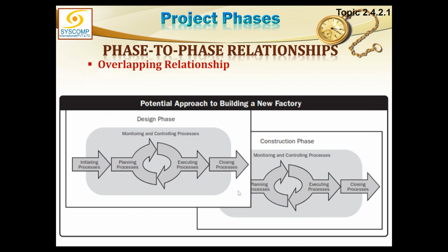This is how it looks when you are working with overlapping phases. You see the design phase is still going on. It is still not closed, but much before it's closed, you have already started the construction work, right? So I don't say this is not possible. I am saying yes, of course, people do it like that, and that is very much applicable also. But this increases the risk. This we must always keep in mind.